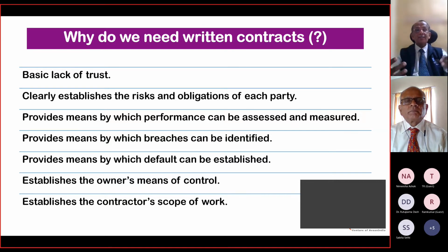Any amendments can be incorporated. There's no problem. But essentially, you have to have the basic documents, and as and when you go along, you can add. There could be change orders. All this will be part and parcel of the contract, an appendix to the original contract. I hope it's clear.